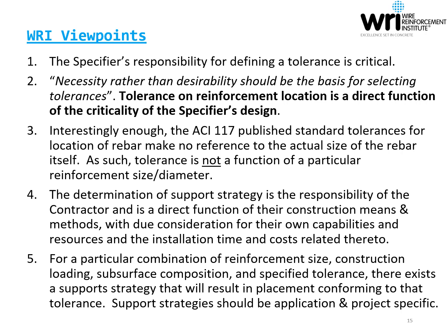Fourth, the determination of support strategy is the responsibility of the contractor and is a direct function of their own construction means and methods, with due consideration for their own capabilities and resources and the installation time and costs related thereto.